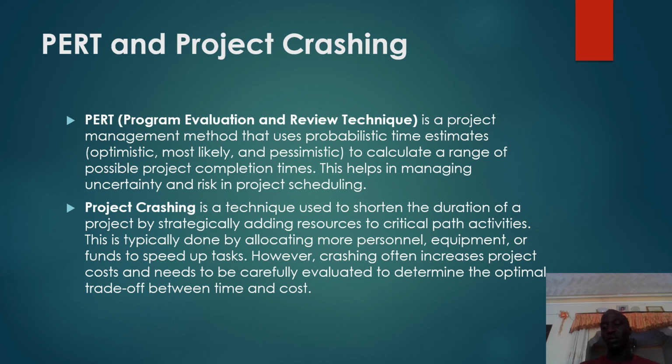This is what I've been talking about in my previous slide. Then we have project crashing. It's a technique used to shorten the duration of a project by strategically adding resources to critical path activities. However, crashing often increases project costs and needs to be carefully evaluated to determine the optimal trade-off between time and cost.